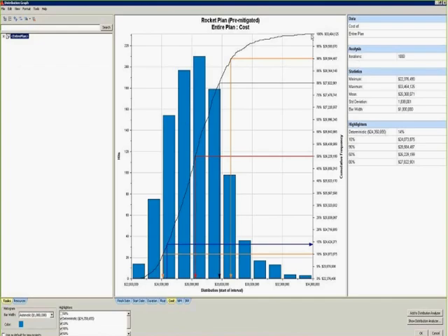In this case, just to take a quick look, we see that we have a 100% probability that it'll cost up to 33 million. Our 90 is at 28. Our 50% is at 26. But check this out. Our deterministic cost is 14%. So if you went with your risk plan to your superiors, you would have basically an 86 chances out of 100 that you would end up costing more than what you thought. And that's on the cost.